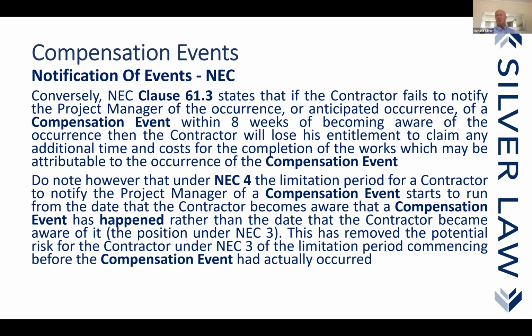The project manager, the employer, denied the contractor had any entitlement. They had, in their arguments, not issued any instruction. But even if they had, the contractor had not notified it within 8 weeks. As I say, I was the adjudicator. And the first thing I decided is that because the project manager had confirmed what was required to be done, and that had been recorded in the minutes, this constituted an instruction. It was in a form that could be read, copied, and recorded, and it did constitute a change to the works information. So as far as I was concerned, it was a compensation event.